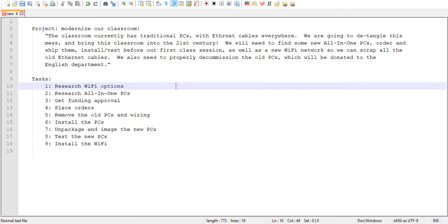So my next step is I want to estimate the amount of time each one of these tasks is probably going to take to complete. And if you recall, our time estimation using the PERT technique, we're going to take our optimistic plus our realistic times 4 plus our pessimistic time. I'll put spaces in here to make it a little bit clear.